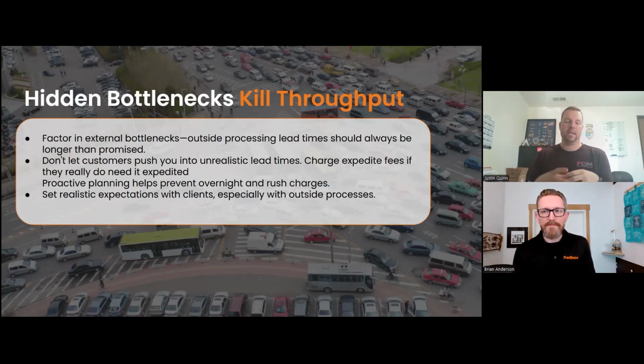One of the things we found really helpful is to quote your accurate, no extra cost lead time, and then hit them with the heavy expedite fee. Let's say you're quoting 8 weeks and they want it in four. Now you need to make this part 100% under overtime, so your part cost has gone up 50% just in labor time. If you're going to overnight ship to plating and overnight ship back, maybe you weren't factoring in shipping charges at all, and now you've got $200 to $500 extra.